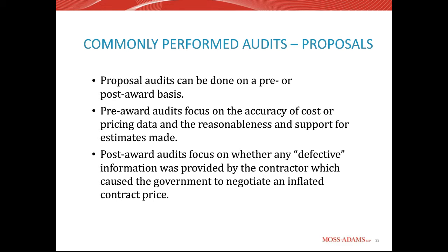So, every time I would sign a certificate of current, accurate, and complete cost or pricing data submitted at the time of agreement upon price, which is what we're talking about, that's kind of the key concepts behind it. When I'd sign that certificate, I would basically rerun my proposal, gather all the information that I needed, because essentially it is a big risk, and it is something that we just want to highlight to you as you're working in this environment, that there are personal risks and company risks associated with submitting a proposal to the government, especially on a fixed price basis, particularly.